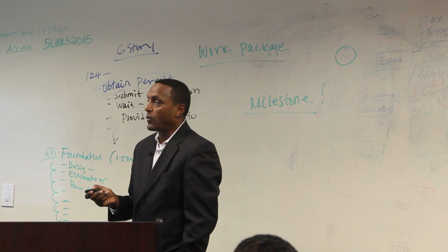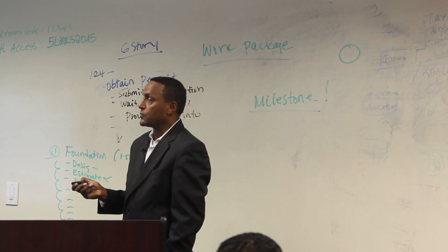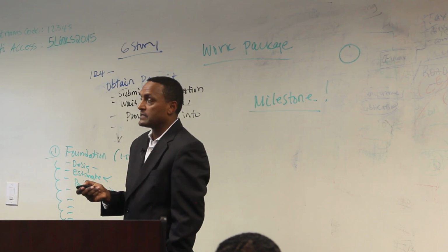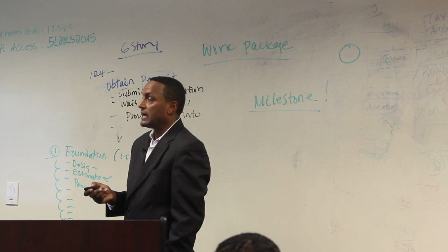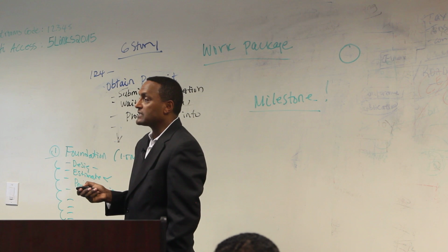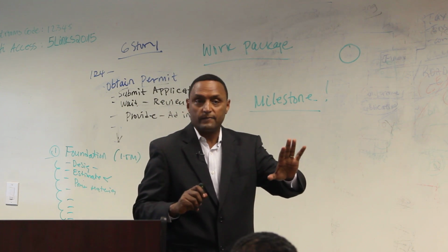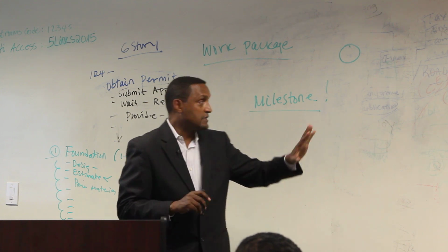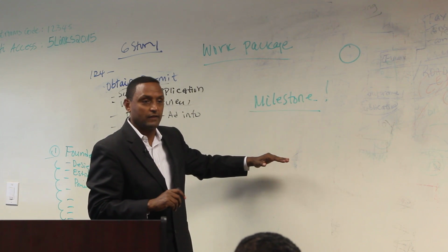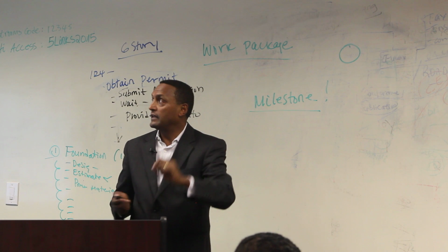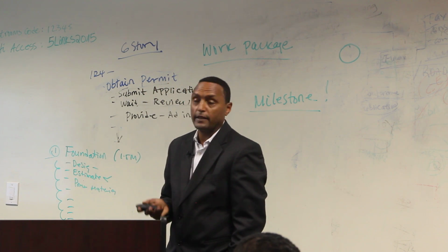The quality control process is concerned with correctness of the deliverables, which makes the quality. And this one, validating the scope, is primarily concerned with acceptance of the deliverables, because we haven't started doing that yet. But this is what you will be getting. So you have to validate. That's part of the scope management.